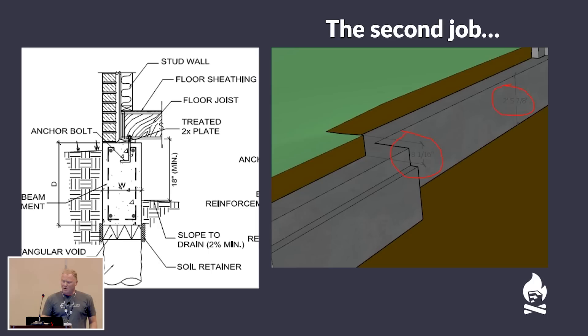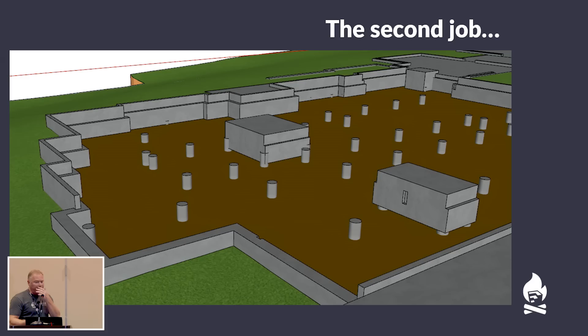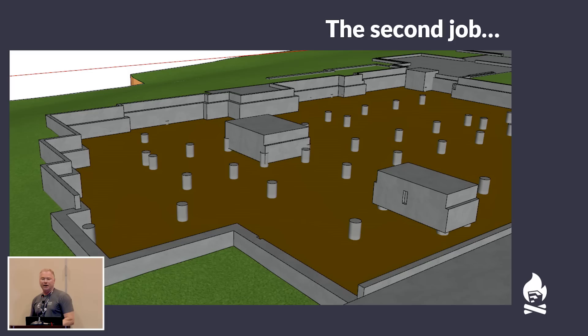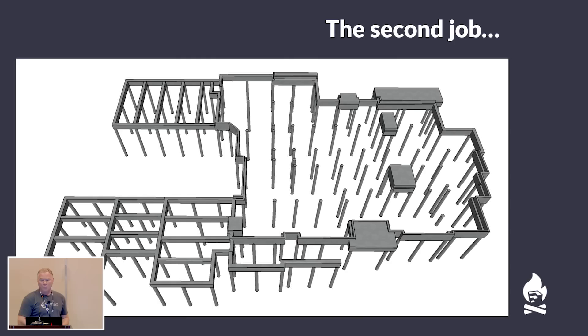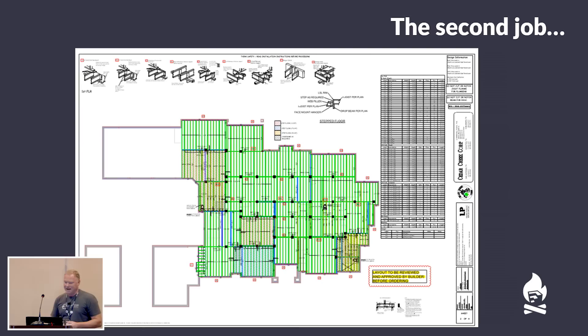I modeled the topography with all the grades and found the plan showed a stem wall with a TJI floor system on a sill plate — meaning they'd be backfilling eight inches of dirt against the band joist. They were two weeks from starting, so we went back to the engineers and asked if they could do an inverted brick ledge, raising the stem wall up. They made all those changes before the concrete guys showed up — that alone would have been a very costly mess and delay.